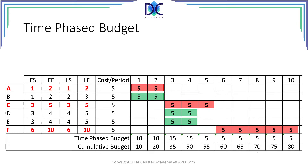In period 4 it's 15 plus 35, which is 50. In period 5 it's 5 plus 50, which is 55. At the end in period 10, the total cost of the project is 80, which is also what we call the budget at completion.